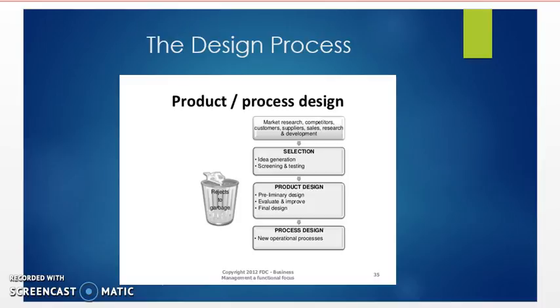Now we have preliminary design, which is the first phase of the process design. A project manager is assigned to the project and will coordinate a series of meetings with users and the design team for information gathering. Users communicate specific needs and requirements, and the design team will do field investigation regarding the layout of the existing areas, including building systems and their impact on the project.